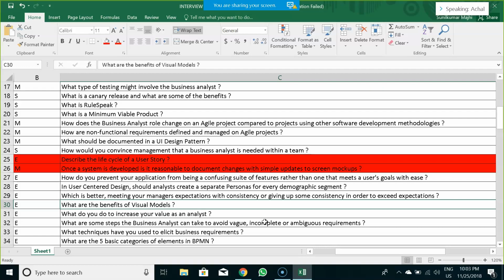Basically, user stories are used to capture the functionality or a feature that a system or software should provide. At the beginning of the project itself, user stories are identified and developed in a story writing or brainstorming session. We write epics and then convert them into features and user stories. The team comes up with as many user stories as possible in the user story document, and each story is sized and prioritized for how the project should work.